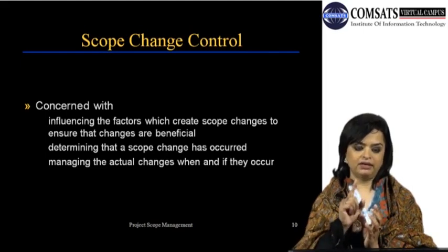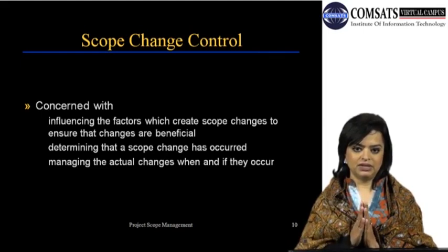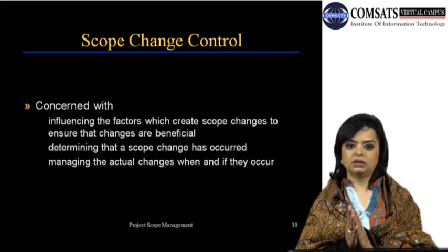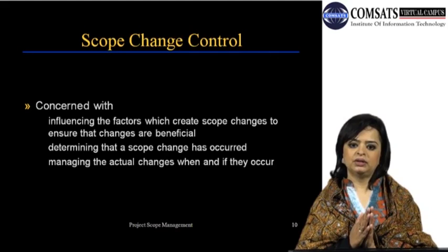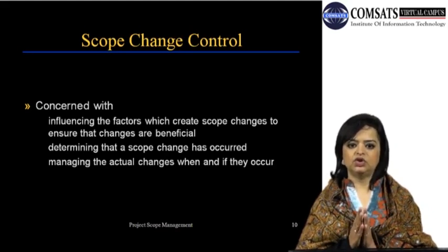Moving on, not just the planning phase, moving on to the monitoring and the control phase. So that is the start of the execution phase. Under the scope change control, from this point onwards, all changes, whether small or big, whether they change the target date or not, all changes should be documented.